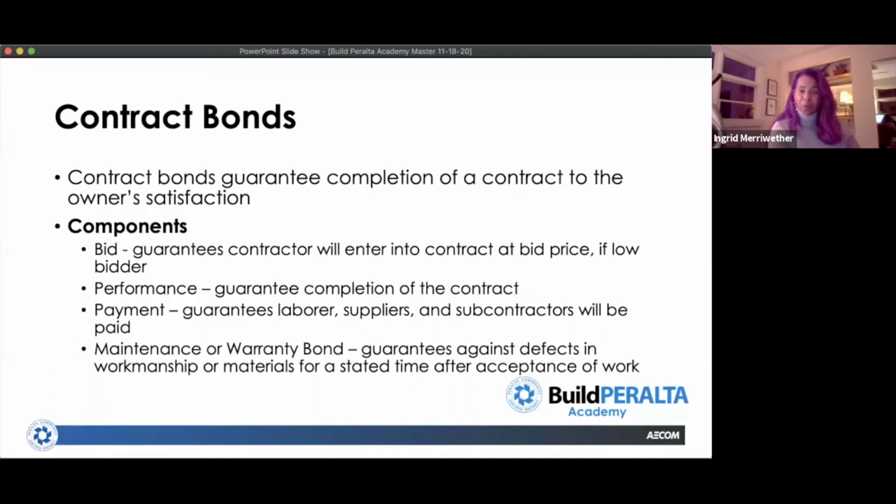If you fail to perform under the contract and you are defaulted essentially for your failure to perform under the terms of the contract, then the obligation of the bonding company is they have to step in your place and ensure completion of the contract. So they bring in a replacement contractor, they have to perform the balance of the scope of work. That may even include redoing some work that was already done, and they are financially obligated up to the penal sum of the bond, which is essentially going to be the same as your contract value. So that's the obligation that the bonding company is taking on when they agree to provide you a bond: they are essentially guaranteeing your performance of the contract or having to step in themselves and perform the contract if you fail to do so.